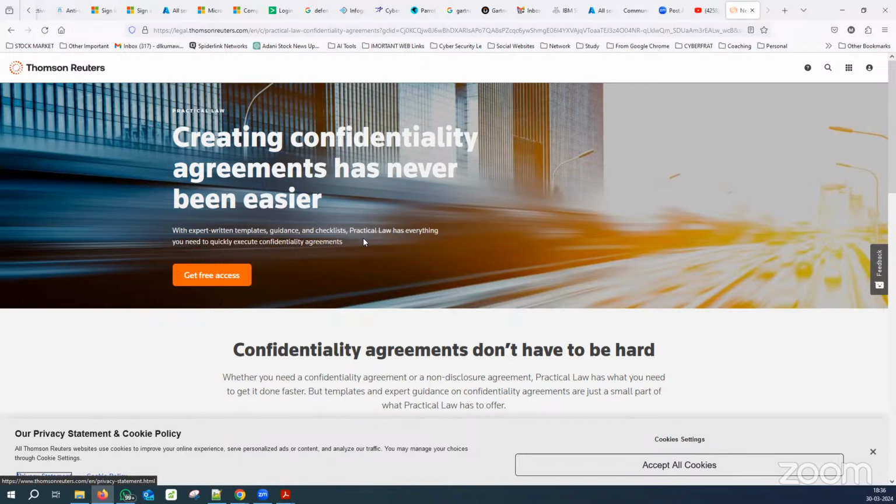So the first stage is basically to find the specific vendor, shortlist the perfect vendor, and do the POC of the vendor. Once you have shortlisted the vendors and everything is finalized, the costing parameters and scope definition, everything agreed, after that you do the NDA. That's how you can do it.